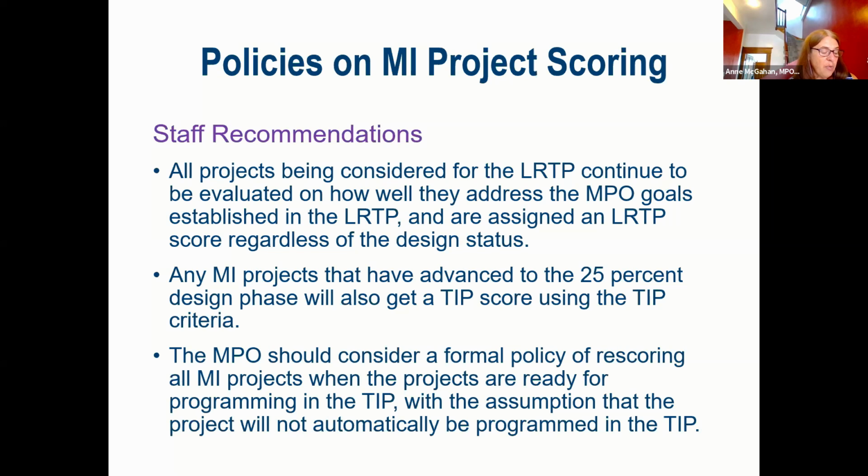In addition, staff recommended that the MPO adopt a formal policy of rescoring all major infrastructure projects when they are ready for programming in the TIP, and it should not be assumed that the project will automatically be programmed. When the project is moved through the design process, more detailed information should be available, especially if it was a project that had been programmed in the outer time bands of the LRTP.